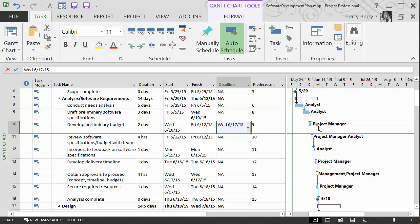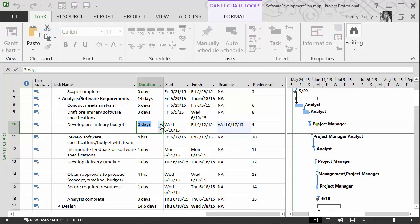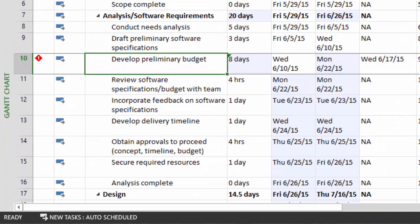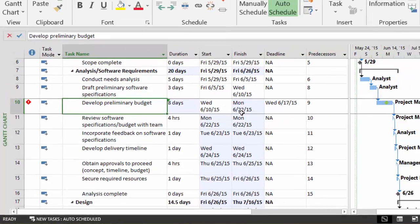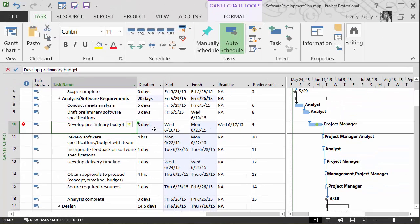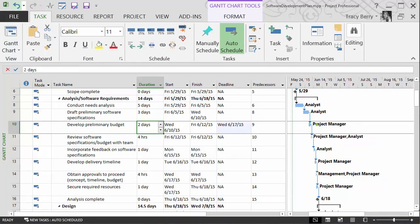We can put all of these deadlines in. Now if we miss a deadline for whatever reason, I'm going to go ahead and make this seven or eight days, and we'll see that it warns me. This task has gone past its deadline. It doesn't stop it from doing that, it doesn't tie up the tasks and make them non-fluid. However, I was warned, and so that's the beauty of a deadline.